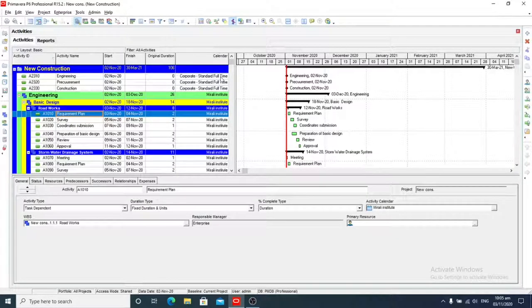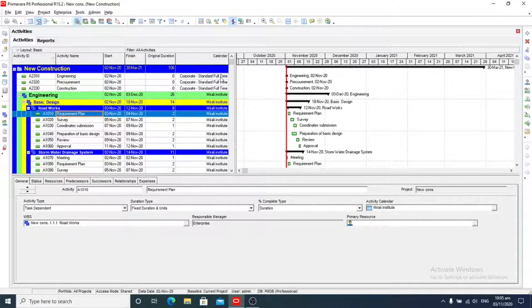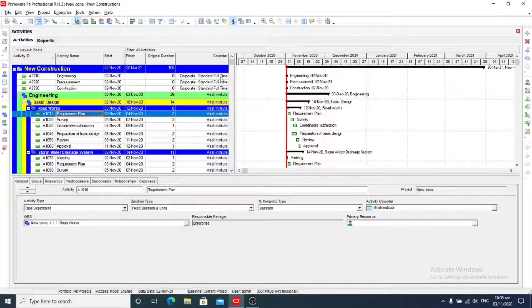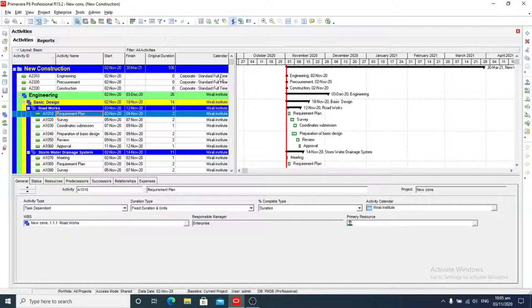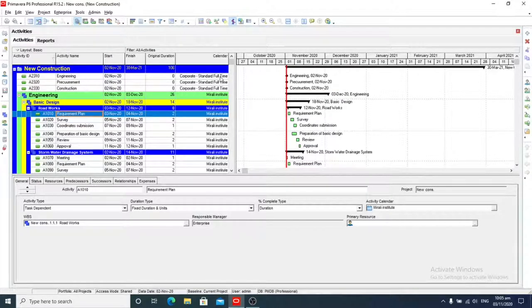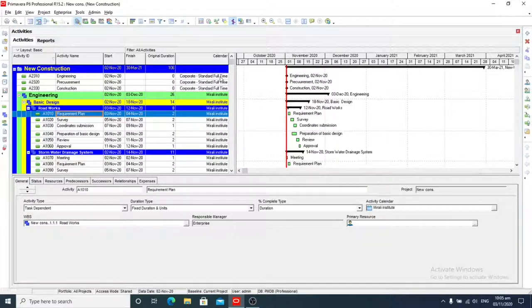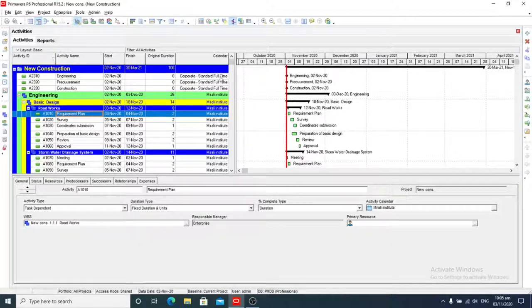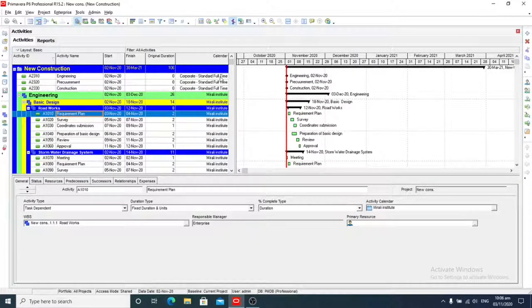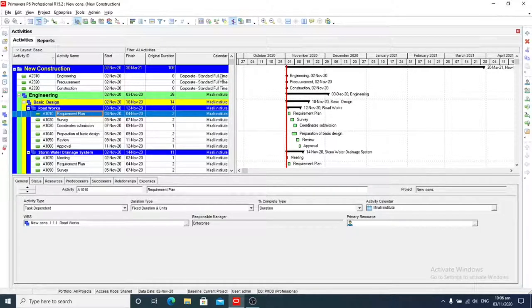You can create multiple activity codes according to specific categories, then assign different values for each code. For example, assume your organization has many departments and you want to review activities within each department. You may first create an activity code for department, then assign different values such as quality, finance, and sales. You can then associate activities with specific departments.